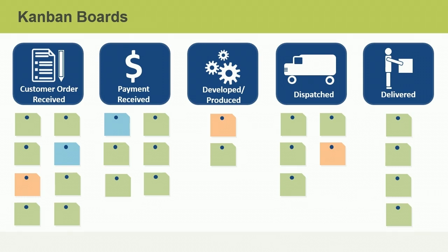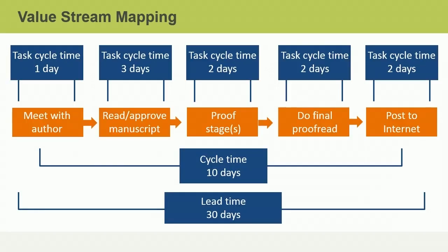While it may seem like multitasking is a good thing, in fact, too much WIP bogs down the system and makes everything take longer. Value stream mapping is another useful tool to help identify those activities that add value and those which may contain waste. The cycle time is the actual time doing project tasks that contribute to the deliverable that the customer will see. In every process, there will be wait time, delays, or inefficiencies that do not contribute to the deliverable.